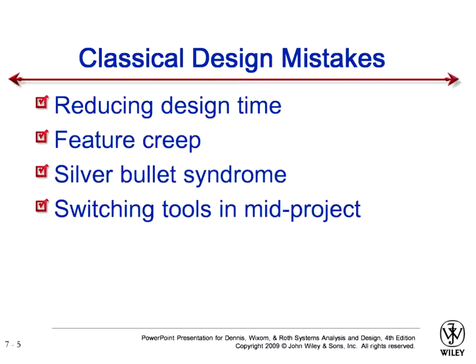Another classical design mistake is switching among tools in the middle of the project. If you are using a certain tool and you hear about another tool which has very good success stories, and people are more inclined towards that, even then it is not recommended to switch to or upgrade to a new tool when you are in the middle of your project.